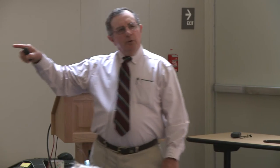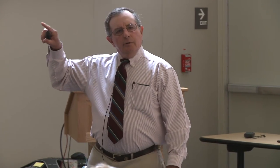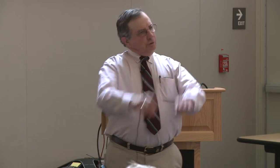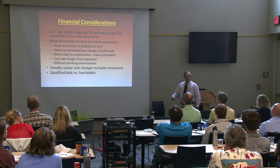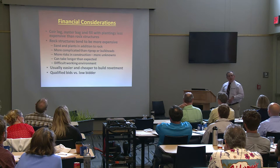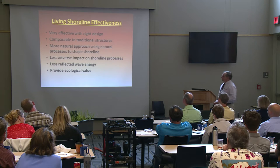But this is something that can be done in the procurement process that is really, really important, is to pre-qualify the bidders. It's not hard to do, it's accepted practice, and it gets you out of having to accept the low bidder with no qualifications. Because that does happen. You'll get contractors that'll lowball you, and you're stuck with them. Not good.